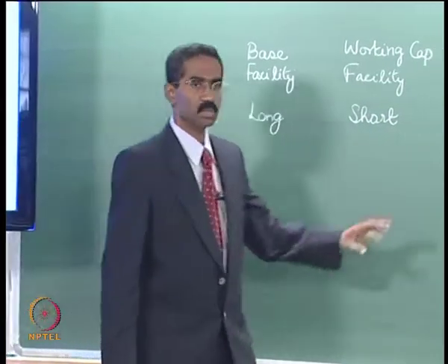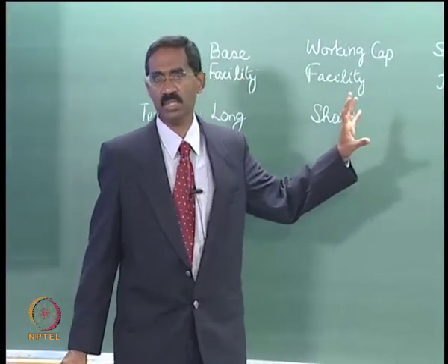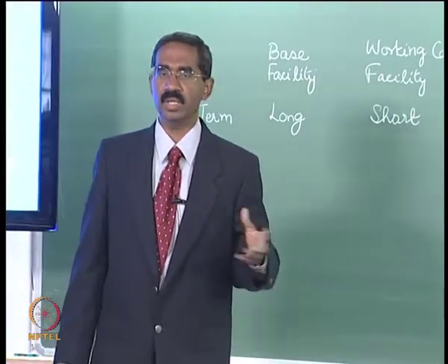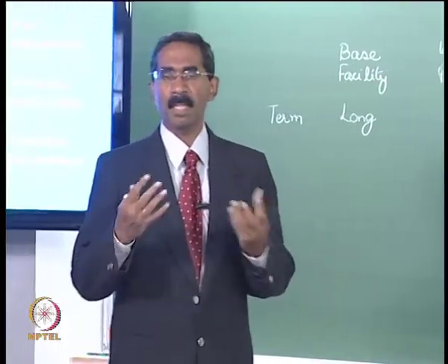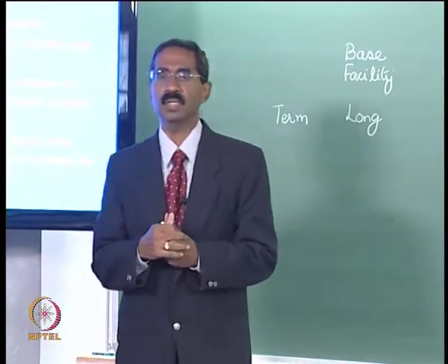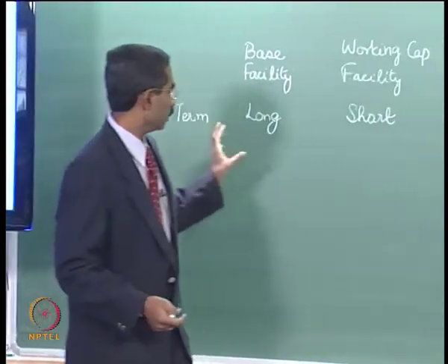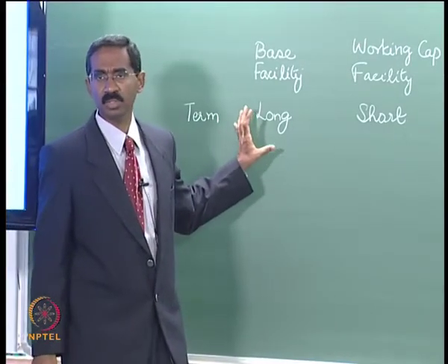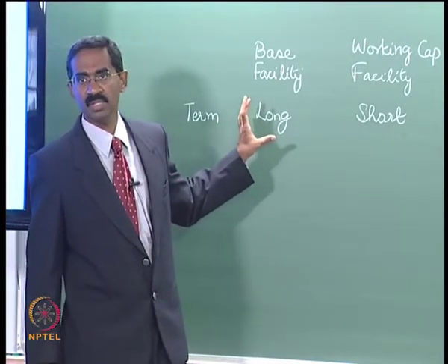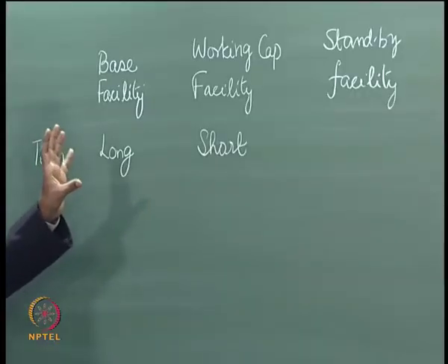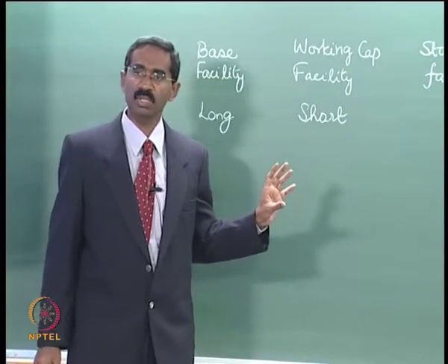And then what is going to be the standby facility? Standby facility is essentially to take care of any exigencies, any excess in terms of requirements as compared to what has been budgeted. So therefore the standby facility is actually going to boost up the facility that is available for construction and development of the project.